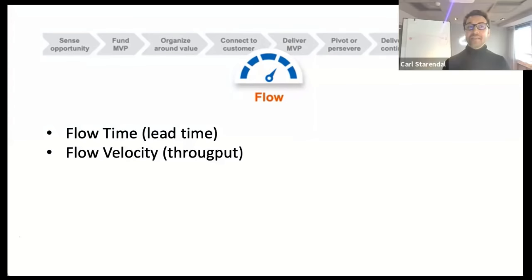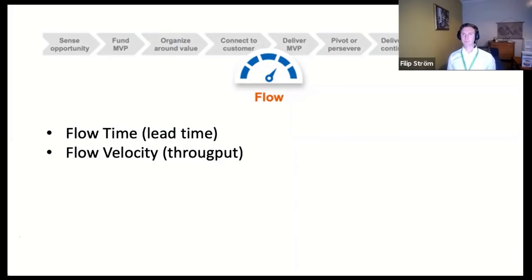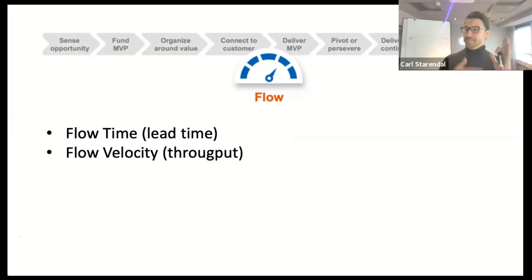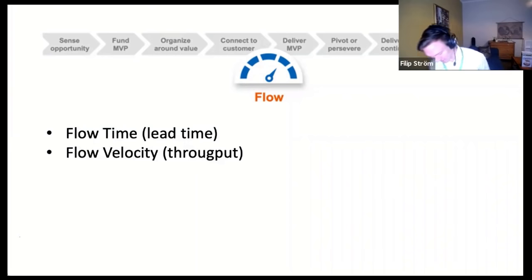The key thing is, if you're not diligent in first establishing the flow time, that discussion will never happen. People will just say, please work faster. And you're like, well, our flow time is huge, probably because our features are huge. So I would start with just seeing the number and then start there. And that would also mean if you have features of that size, your throughput is 0 PI after PI, which would also be a great data point to have. Yeah. Except, of course, we're working on 50 different things. But yes, I understand. Okay, good. Then I know we're not going crazy. You're doing the right thing.